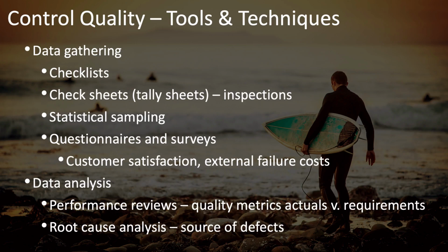Also, data analysis techniques such as performance reviews. Now, these are not performance reviews of individuals on your team. This is about measuring your quality metrics and comparing actuals to your requirements and reporting on your quality performance. And root cause analysis to find out the source of defects.